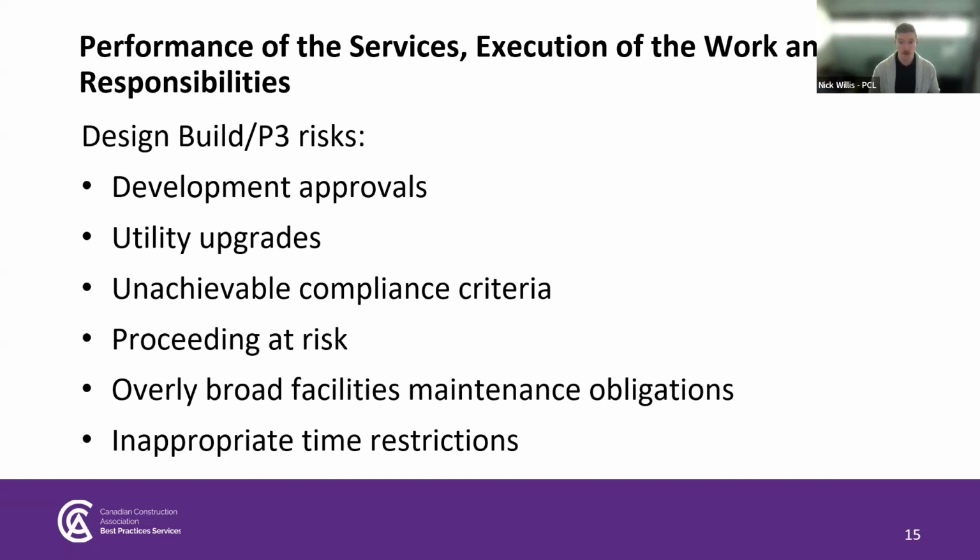In recent design build projects, owners have begun introducing open-ended, long-term facilities maintenance requirements, for example, mandating a 15 to 25-year design life for certain components. This is problematic because outside of the P3 context, facilities maintenance and operation are owner responsibilities. Contractors should review these obligations carefully to minimize the risk of disputes after project handover.